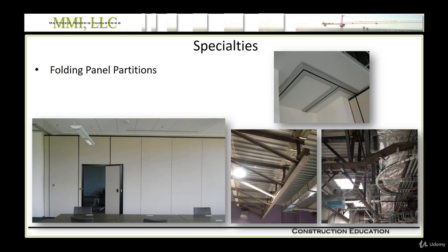Then the drywall ceiling comes in, or the acoustical ceiling tile comes in, paint happens in the room, flooring's installed. Then the specialties contractor mobilizes again, this time with the operable wall. And in some cases, your building is just about complete, and there aren't big holes in the side of the building anymore to get partitions in. So I was on a really large job where the operable wall was enormous, and we had to bring the folding panels in before the enclosure was done, because otherwise we would have never got it in the building. It definitely wouldn't have fit in the elevator. So let's assume you got your panels in, you were able to coordinate that in advance.